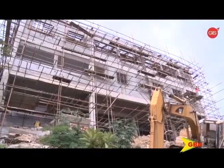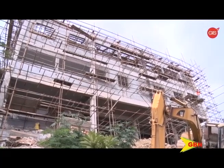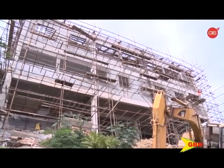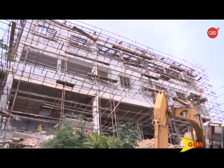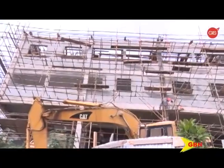That portion is very close to the existing school, because we see it as very important for the long-term functionality of the school. We want to get the retaining wall works done during the dry season as opposed to the rainy season to avoid any sort of catastrophic failures. The project is also providing employment for many Grenadians.